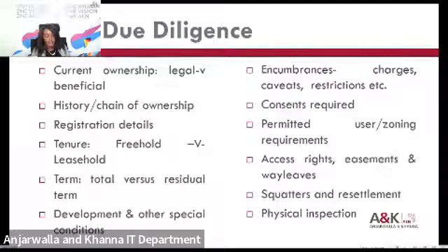The third question is, do you have examples of where community land issues have negatively impacted a project, and how do you deal with this? So off the top of my head, without breaching any confidentiality, I can think of one project down at the coast where the project company entered into agreements with persons who are perceived to be the representatives of the community to sell land to a project company.